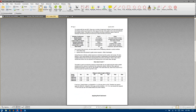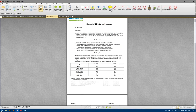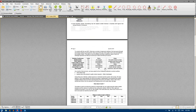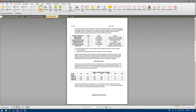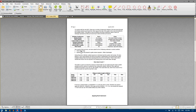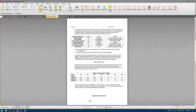The engineers can follow a lot of different codes to downgrade things based upon their engineering principles. Now we don't have these rainfall calculations for all areas — that's probably the first drawback. The second one is that we don't know at that point in time what size gutter or who your preferred installer is, or what kind of gutter you're going to put on the house. Whilst we could make assumptions, if we do make those assumptions and don't clearly notate them and you choose to put a different gutter on, there could be implications.